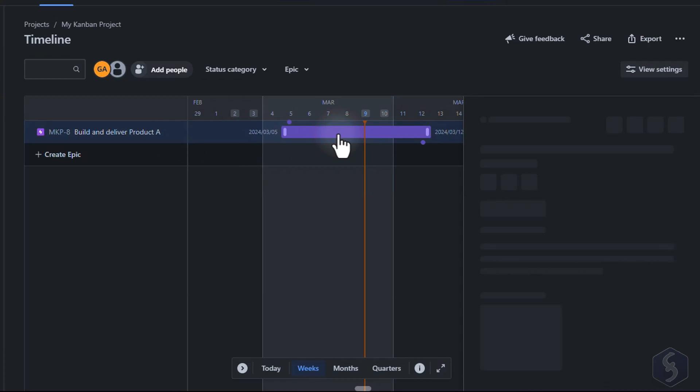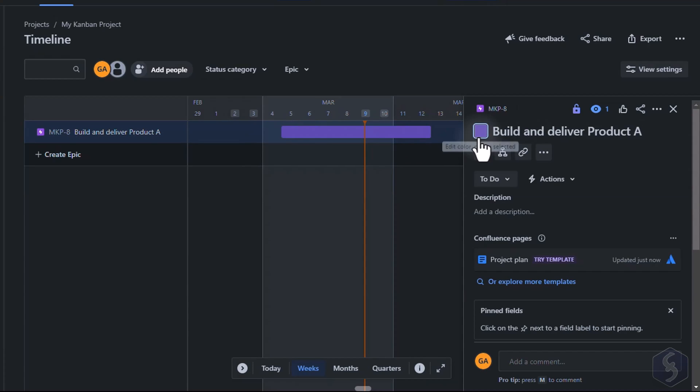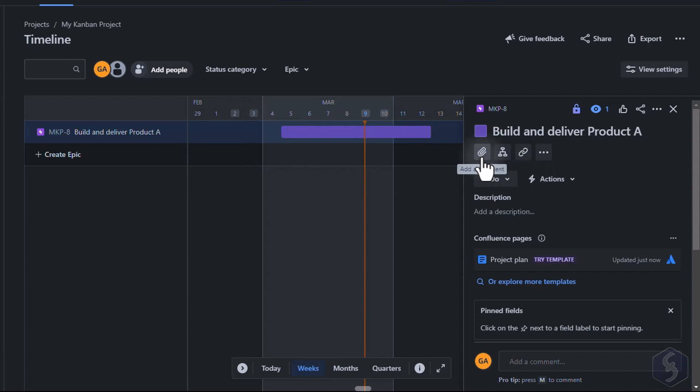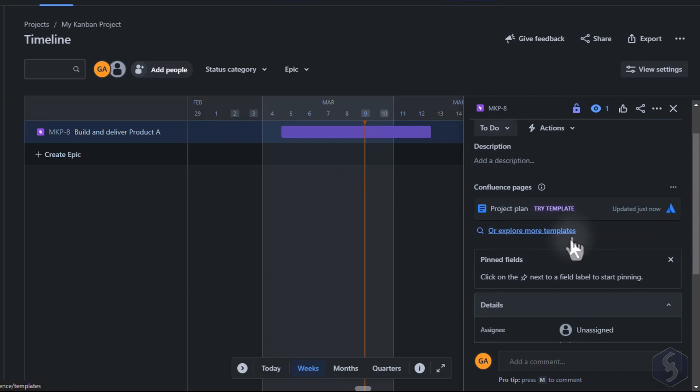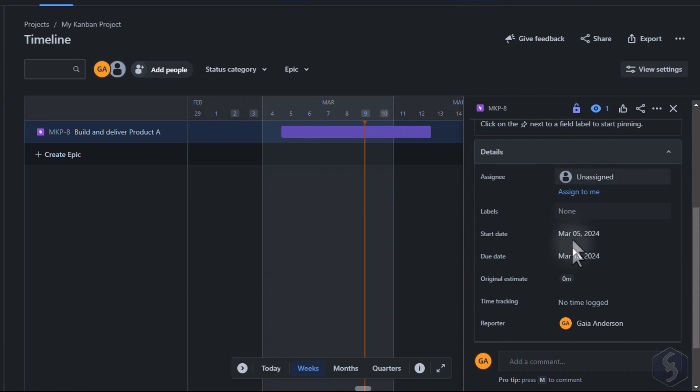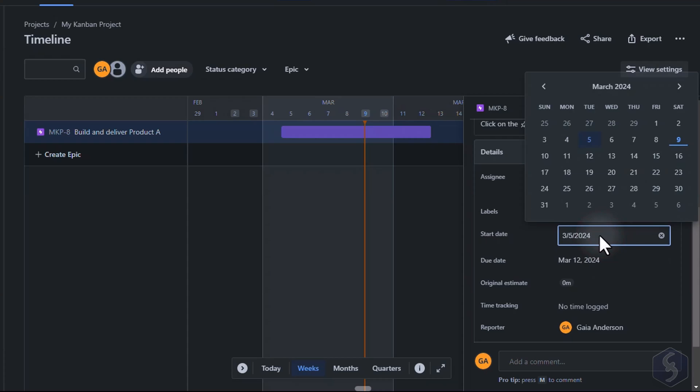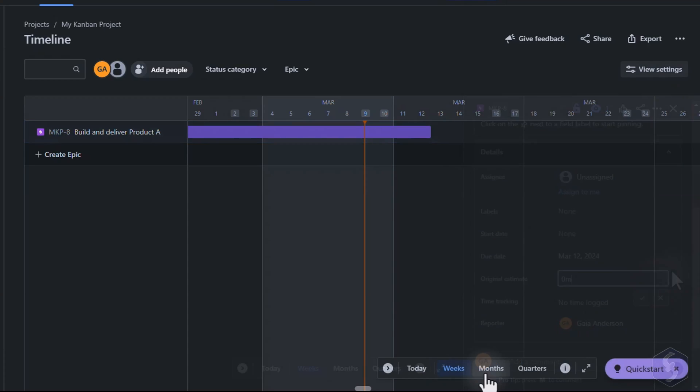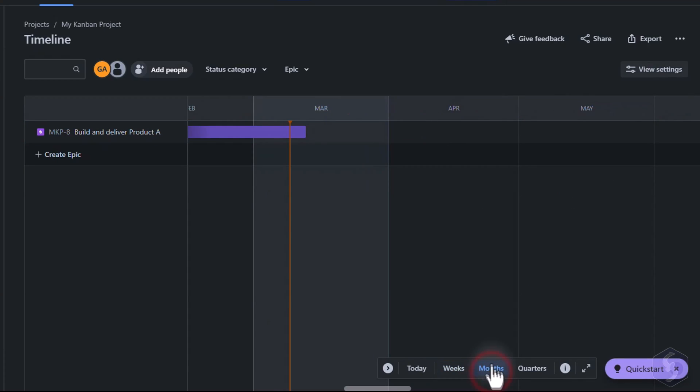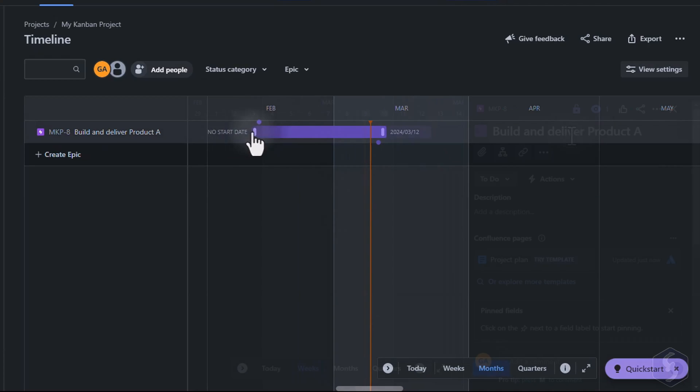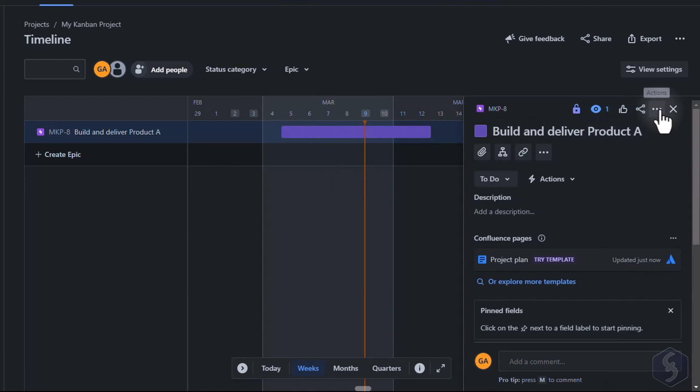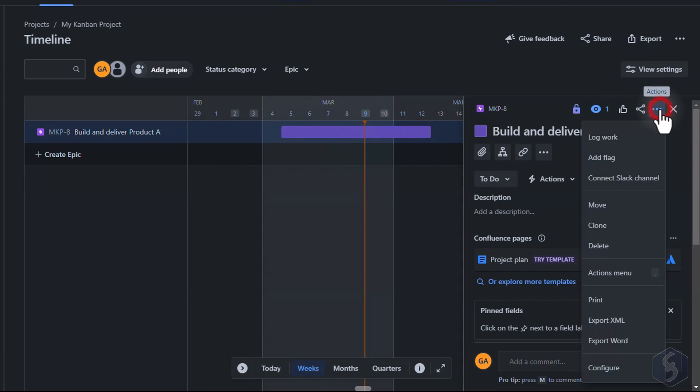Click on the Epic block to change its color, attach files, set its status or assign it to a project member. You can also remove any start or due date if these are undefined, shown as grayed out block edges. Go to Actions at the top to manage or remove the Epic issue.